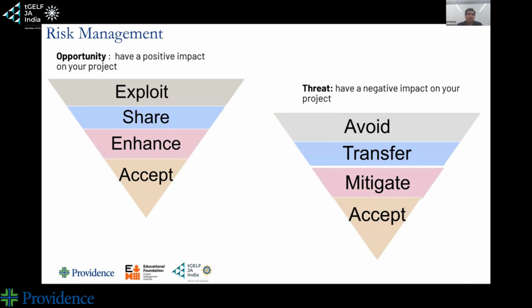Say we planned for a steel bridge that required so much, but we got less supply. Because of getting less supply, we ended up not wasting a lot of steel, and we really rethought our process. So we actually saved money. That risk of getting less steel actually turned out to be an opportunity, where the next bridge, when we factored in how much steel we required, did not require 10,000 kilograms or whatever. It required only 9,000, right? So a risk can also come as an opportunity, not as a threat.